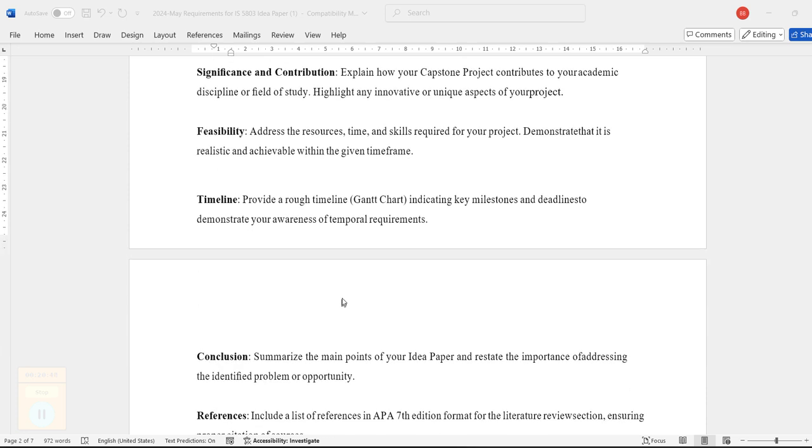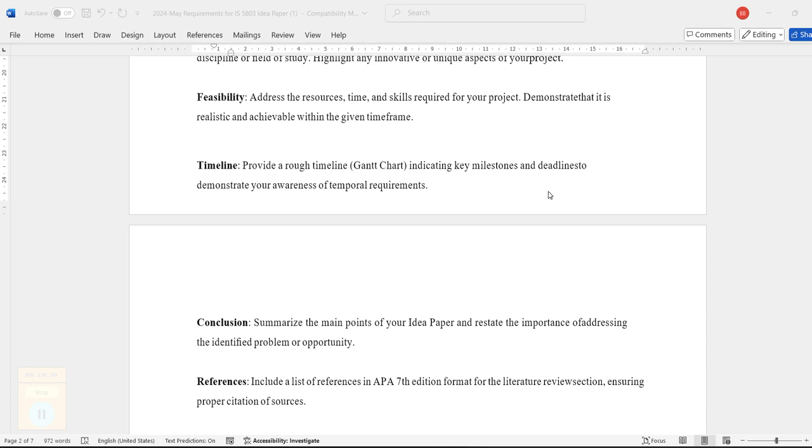Now, in this section, create some important elements like the different phases of the project, maybe software requirement analysis. For a software development lifecycle, there will be 5 to 6 phases of development of the project. Use those 5 steps like system requirement analysis, system design, system development, implementation, and testing. There will be different sections.